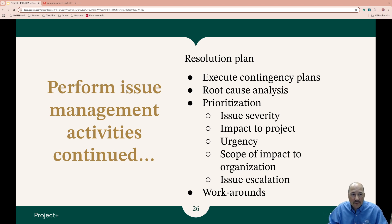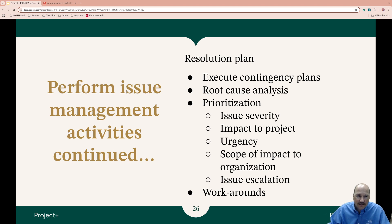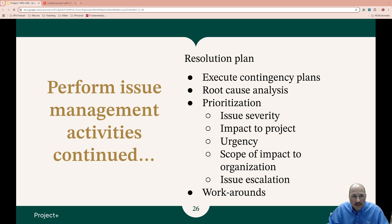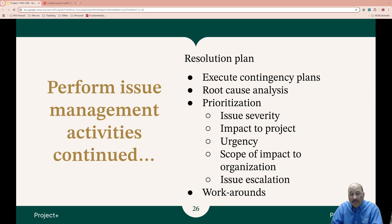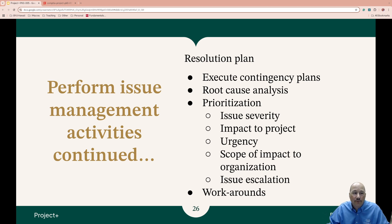You should prioritize your issues. Issues can be prioritized in many ways: severity — how critical it is; impact to the project; urgency — how fast it needs to be resolved; and scope — how many people does it affect? Sometimes an issue will exceed the authority of the project team and need to be escalated. For example, if your project has a specific budget with an allowed percentage overage, and the issue causes you to exceed that, you now need to escalate for approval.